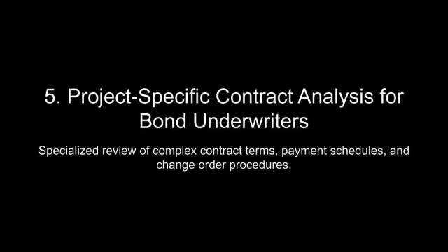For sureties, mediation offers the advantage of preserving relationships and minimizing legal costs, but it may not always resolve disputes definitively, leaving the door open for subsequent arbitration or litigation. In cases where mediation fails, the unresolved issues can create prolonged delays in bond claim resolution, complicating the surety's ability to fulfill its obligations in a timely manner.